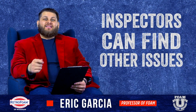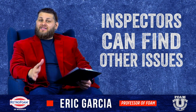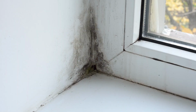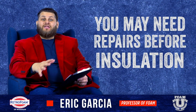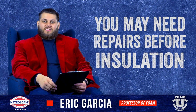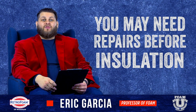Another good reason to have a professional out to check out the project as a whole is that they could find other problems in the building that maybe you weren't aware of. One thing that is semi-common is moisture issues. If you have a penetration in the building envelope, that means air comes in, and moisture will always come in with it. Sometimes that will cause a lot of problems. If that person notices something and points it out to you, maybe that's something that needs to be repaired or replaced first before you insulate. Again, that professional should be looking out for all that for both you, the customer, as well as the install crew, because if there is an existing problem, it will affect both. So again, another good reason to have that professional out and check out the building as a whole.